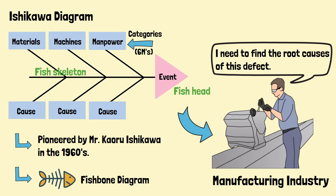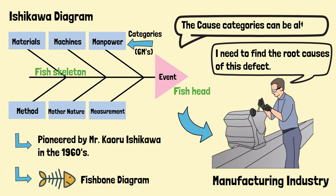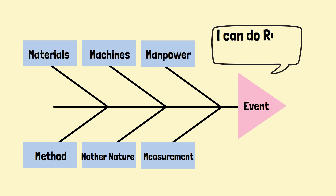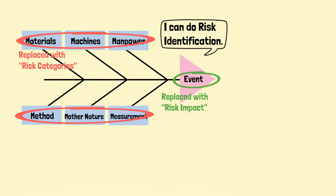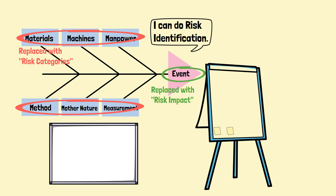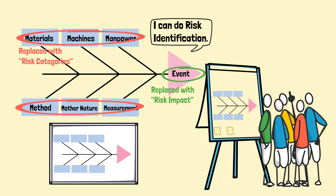The categories can be changed based on the requirements. The structure of the Fishbone Diagram can be used for risk identification. This can be done by replacing the event and categories of causes with impact and risk categories respectively. What is needed in the risk identification session is a whiteboard or flip chart and sticky notes. The fishbone structure is first printed on the flip chart, then the participants can use post-it notes to put the risks onto the diagram.